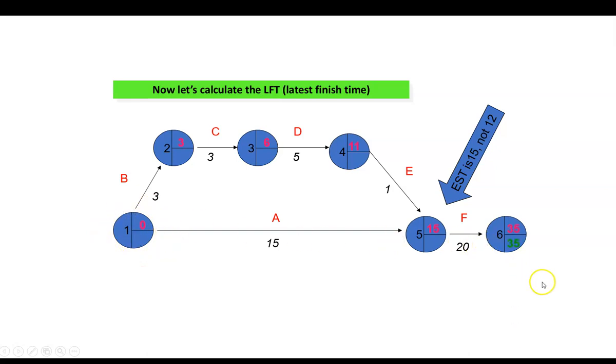So, starting with the same figure here, 35, the latest finish time here will be 35 take away 20, 15. Now we can work back through this channel.